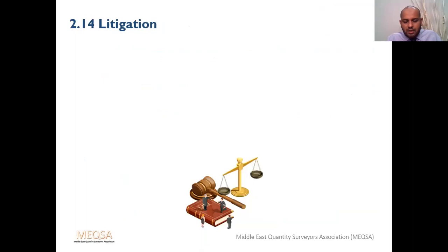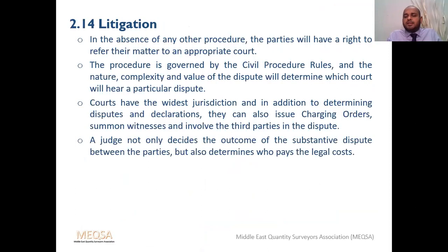Litigation. Everybody knows. In most, all of the Middle East countries, they are following a civil court system and civil law. So civil law in most of these countries is based on the Egyptian civil code, and that is based on the French civil code. So similar legal provisions are available in each case. If you cannot settle your dispute at any level other than arbitration, you will go to the court. There will be court procedures to be followed, and your case will be dealt with by a judge or a couple of judges, depending on the court, and they will give their verdict or their judgment.